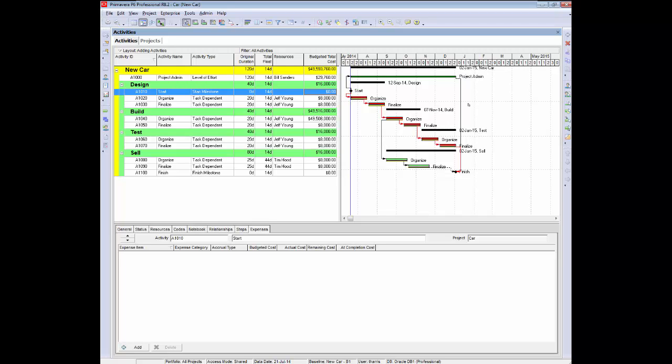And as we go forward in time and changes occur to our project, we will take new baselines when approved changes are made to our project. Then that is a point at which we would take a new baseline, and you end up with several baselines during the course of a project. So that's the optimization of the project and the creation of the baseline.